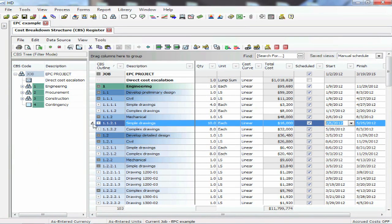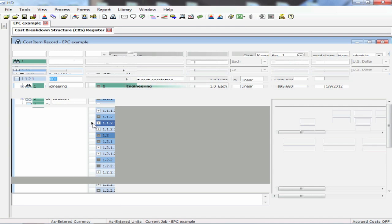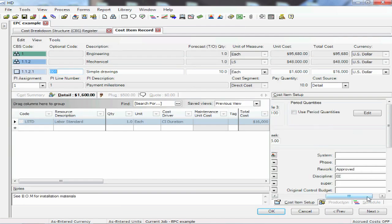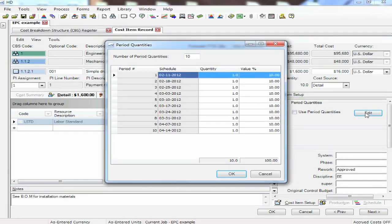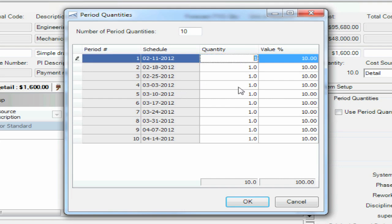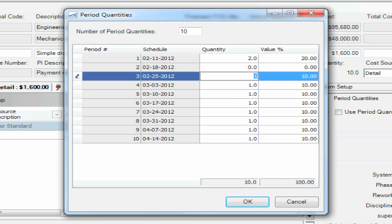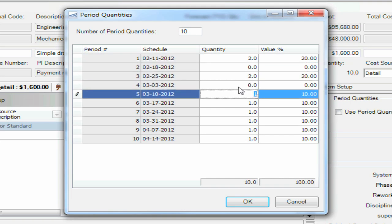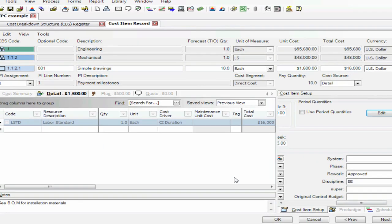If we go down and talk about how we influence the timing of these costs, going into any of these cost items, we have the new capability to break costs into periods — into financial periods. So if we want to break up this particular task into periods, we now have the ability to edit those periods. We can define based on — you can see here I'm using weekly periods: February 11th, February 18th, every week as we go down. We can put in a quantity to dictate how much of this task is going to get done in the first week of February, the next week, and so on. You can use weeks, days, months, years, or quarters — any type of periods you want to use.